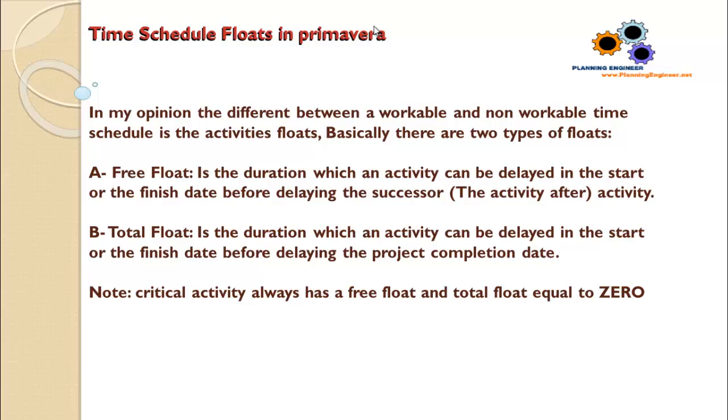It means every day delay in this activity will delay the overall project completion date by one day. And the critical activities always have a free float and total float equal to zero.